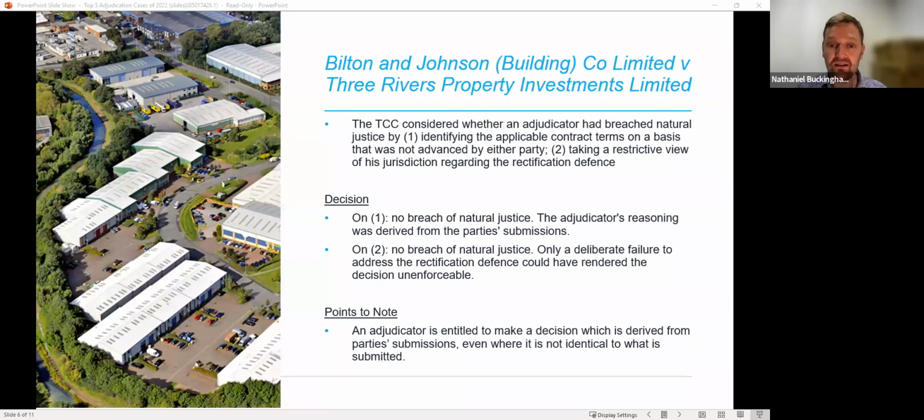In contrast to the tender contract, the JCT contract set LDs at 2,500 per week in total, not per section per week. The project suffered delays and the defendant withheld £234,000 in liquidated damages from the claimant on the basis of the tender contract amount. In the adjudication proceedings, the claimant argued that the JCT contract was the sole formal contract between the parties. The defendant argued that it was the tender contract. Alternatively, it argued that the JCT contract's liquidated damages clause was clearly a mistake that failed to be rectified.